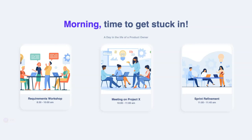I'm going to run this as a sort of story mapping session. So we're going to map the customer journey and then off the back of that break out maybe some new features to support the product and maybe a basis for user stories for me to develop out in more detail later. We might even use this session, if we have time, to do a little bit of light prioritization.